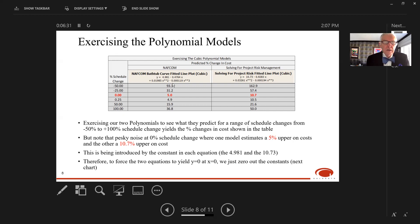Coming down to zero, as we observed from the plots, we're not getting a zero cost impact. At zero percent schedule change, we'd like the NAFCOM curve to give zero percent cost impact, but it's giving us that pesky five percent. Same for the project risk management curve—it's giving us 10 or 11 percent cost adjustment even at optimum schedule.